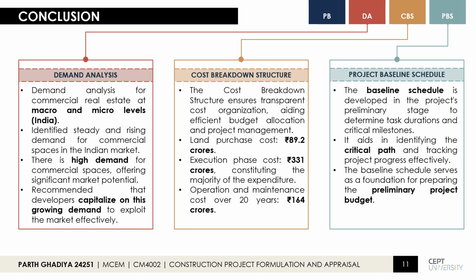Moving to the project baseline schedule. The baseline schedule is developed in the project preliminary stage to determine the task duration and the critical milestones. It aids in identifying the critical path and tracking the project progress effectively. The baseline schedule serves as the foundation for preparing the preliminary project budget.